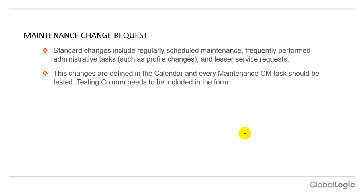Maintenance change request: we perform maintenance on a regular basis — for example, monthly patch management and firmware upgrades as and when received from vendors — to ensure proper working of the system and avoid breakdowns. Standard changes include regular scheduled maintenance and frequently performed administrative tasks such as profile changes or service requests. These changes are defined in the calendar and every maintenance change management task should be tested.